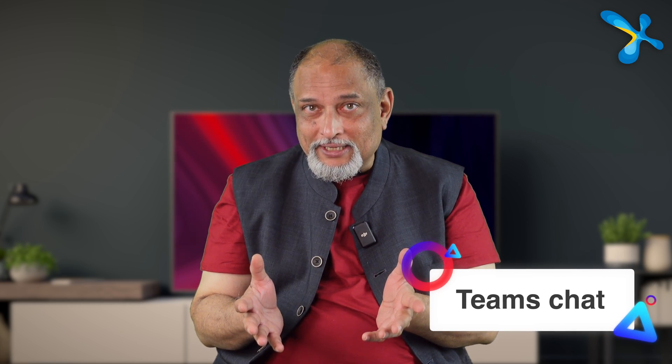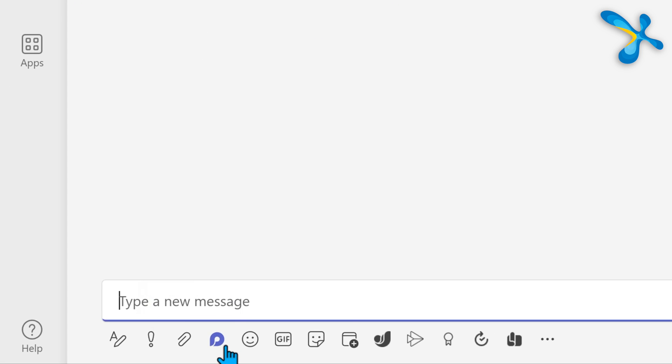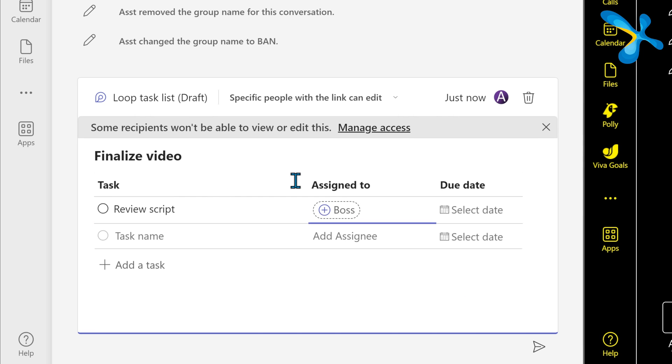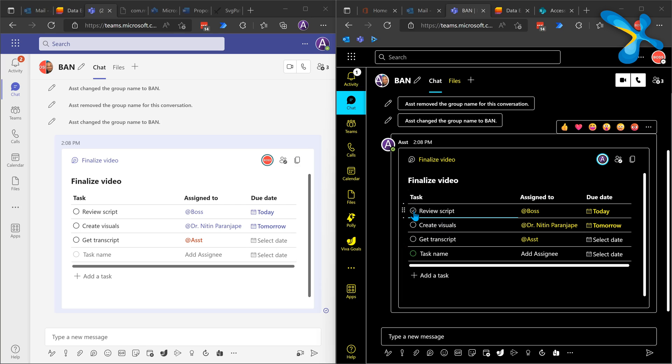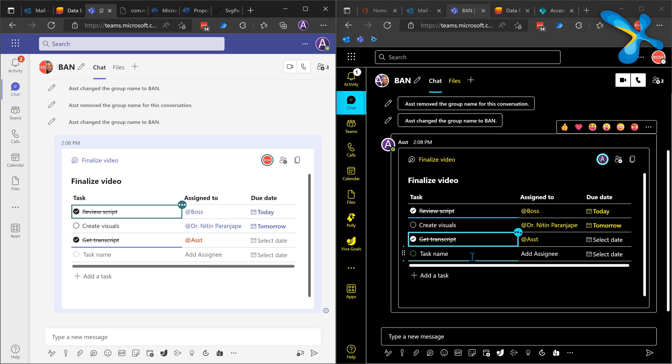For simple teamwork with a few tasks and multiple people urgently involved, do it in chat. In Teams chat there is a brilliant feature called Loop Tasks. Add the team members to a group chat, click the Loop button, and choose Tasks. Add the task, assign a person, and set the deadline. Unlike a normal chat message, this task list can be edited by everyone in the group — updates come instantly, no mail trails, no follow-ups.